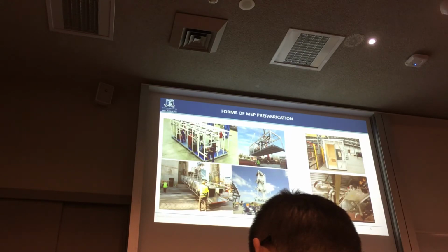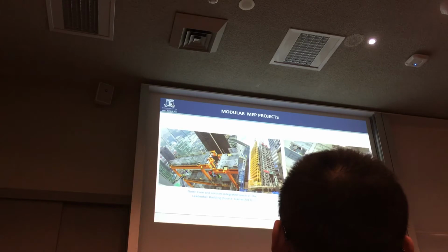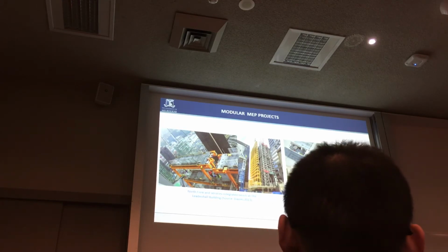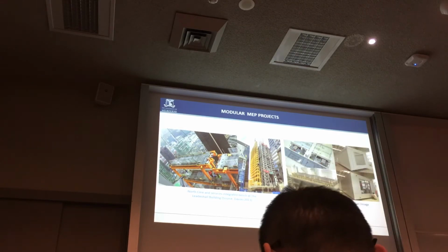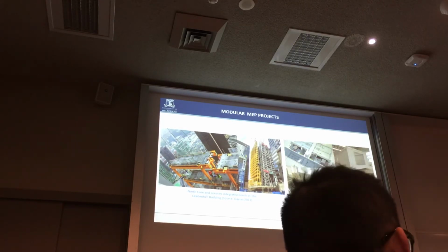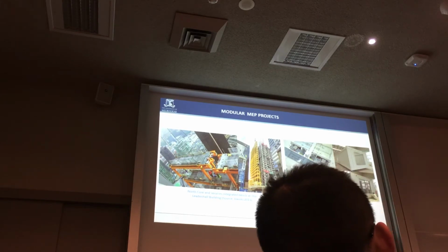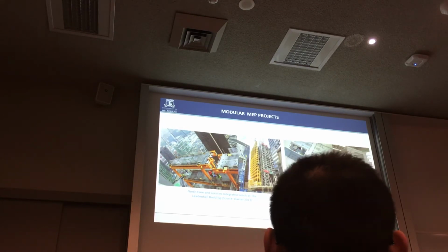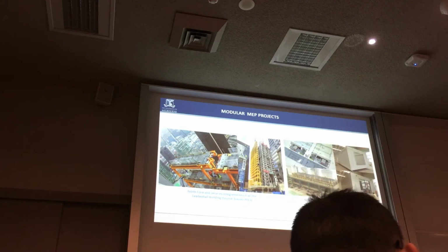Just to show some of the reputed projects around the world, there are not many projects with complete modularization. It's more of an integration of structural and MEP systems. One of the most successful projects was the Leadenhall Building in London, where the entire north core of the building was built using an integrated structural and mechanical system, which reduced the construction time by almost 50%. Another project that I got the opportunity to be involved in is the modular hotel room construction in London. Again, it was an integration of structural and MEP.